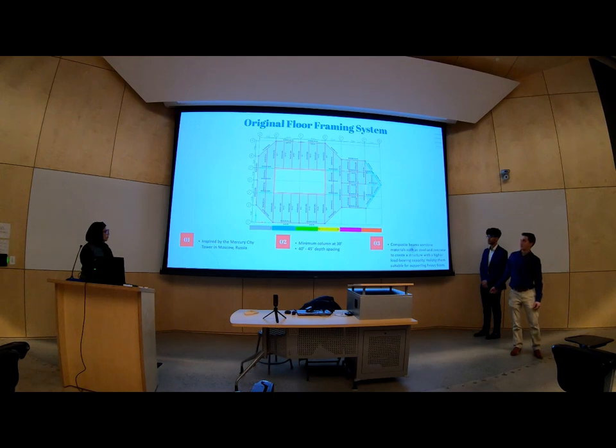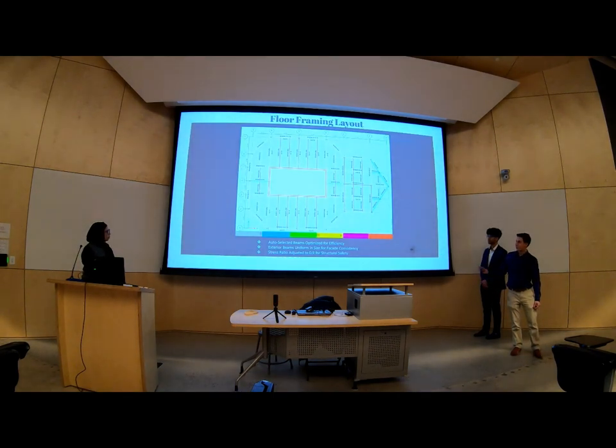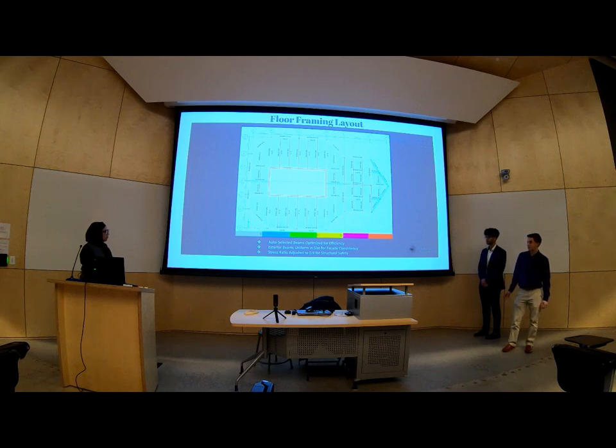So on our next slide, you can see here that not all of our beams are optimized, but they're more similar beams. As John mentioned earlier, this changed our design from having various beams to only having 4 different beam types. This helps a lot during the construction of the tower. It makes it so less variety of material has to be ordered.